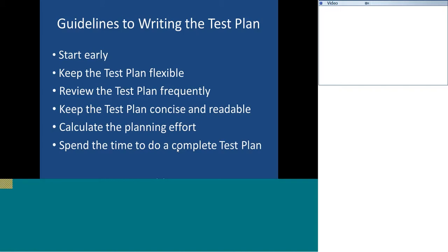So then the best way to capture those things is to have a tentative date. So you can get the tentative dates from the development team, and you can incorporate those tentative dates, and you can also put some comments saying that these are tentative dates and this may change at a later point of time. So the idea is you should get all the details.